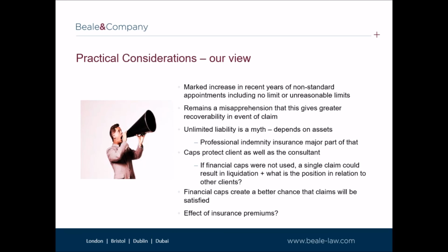It follows that financial caps on liability create a better chance that claims will be satisfied. In addition, unlimited liability could also increase the cost to clients. As there is more risk to the consultant, arguably this should be priced for in any particular commission. Also, an increase in the value of claims because of, say, unlimited liability could impact insurance premiums, which would also be passed on to clients in the tender price. So whilst this may sound like preaching, financial caps on liability must be to everyone's benefit, at least in theory anyway.